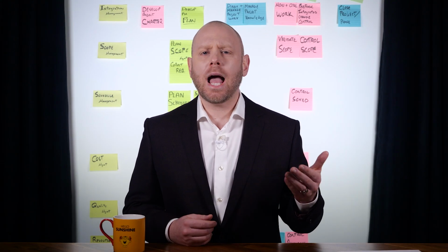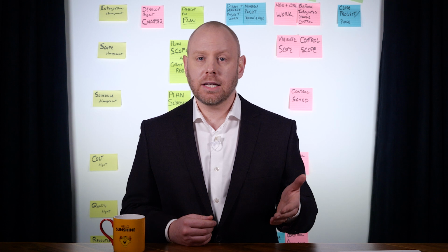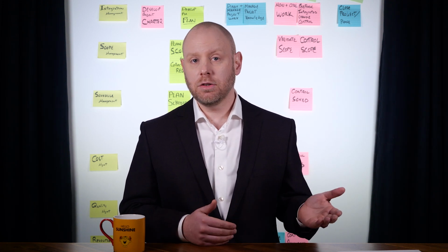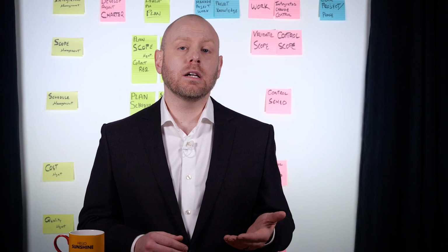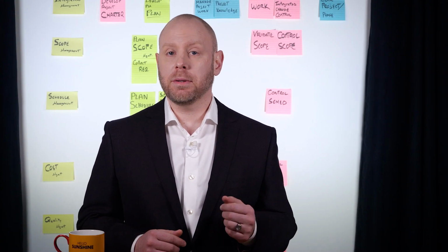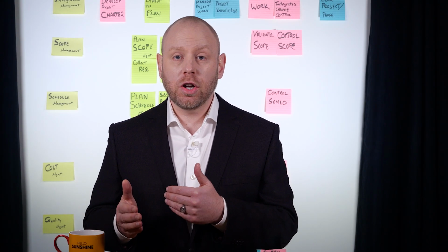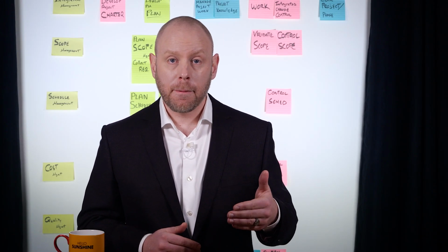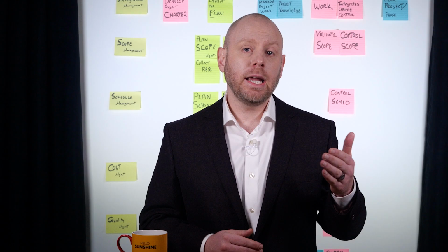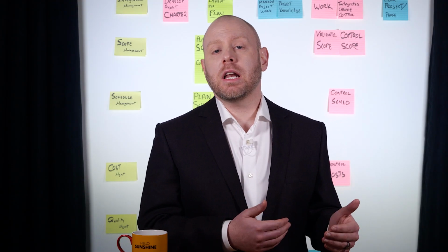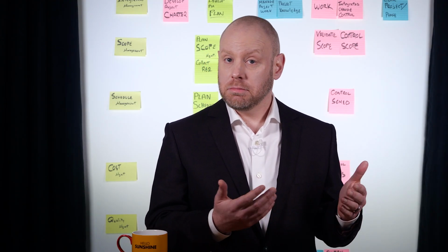Or are you using an agile approach where risk is addressed at the start of each iteration or sprint, as well as during the execution? Agile works well in highly uncertain, changing, or variable environments because of the building block approach and frequent reviews of incremental work in cross-functional teams. It increases the situational awareness of the team, and the understanding and knowledge of risk is accelerated.